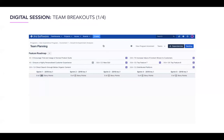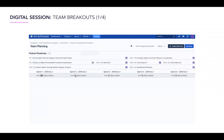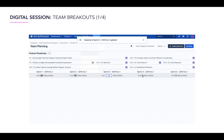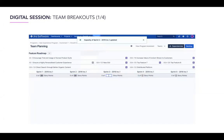In Easy Agile Programs, each team has their own team planning board. Product owners and their teams need to set the capacity for each sprint within their program increment, and you can see that a product owner is able to do that with inline edit. We do have the intention to eventually pull in a team's historical velocity and then give them the ability to inline edit based on capacity adjustments — for example when team members are out of office or on holiday.